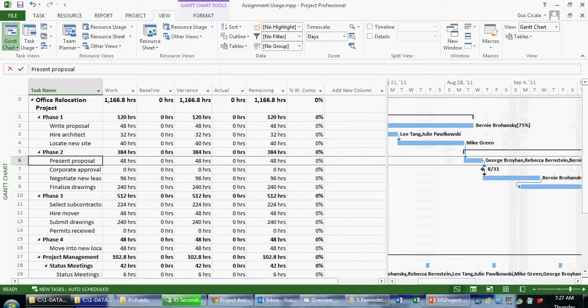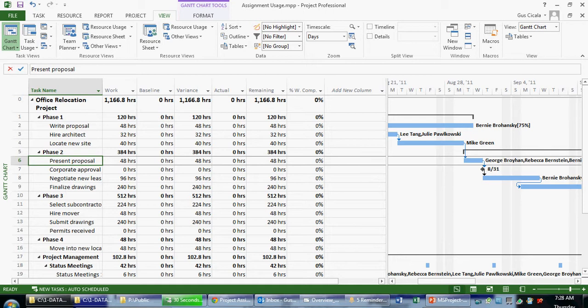So let's click tables and work. And in this case, we see the work-related fields. So that's what note number three is referring to. One of the options is to apply a table.